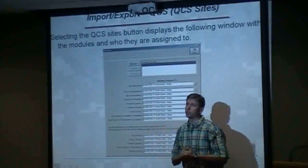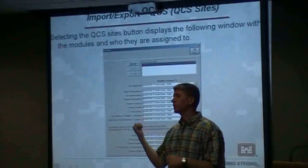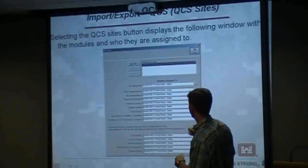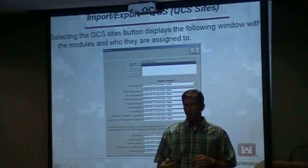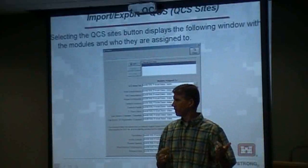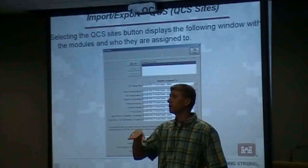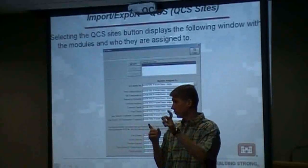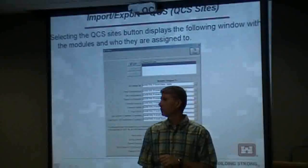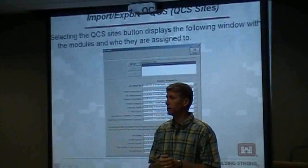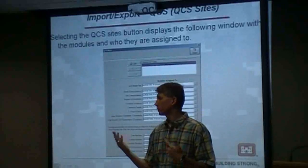This is also a new feature because most contractors would assign daily reports to the QC, and the project manager would keep the pay application. The QC is putting in actual start and finish dates on the activities, so now the activity schedule is assigned to the QC. If you import the SDEF and didn't have the daily reports portion given to whoever was doing the progress payment, it wouldn't populate any dates for your activity schedule — it wouldn't populate the early and late dates.